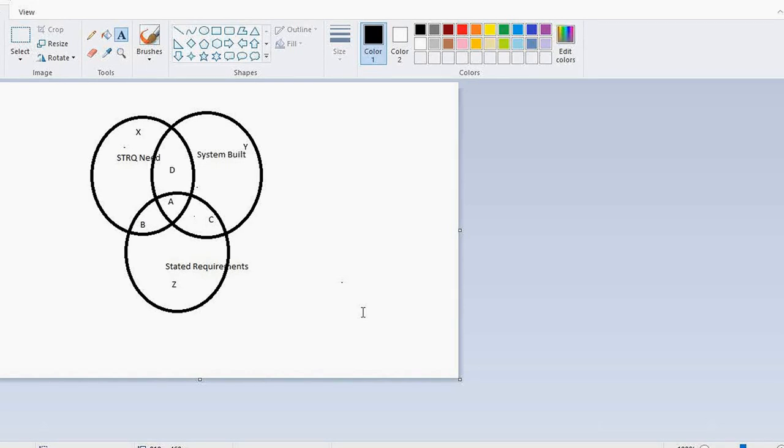So the key aspect is he may come back and say, your executive sponsor is not mine. I understand you want this requirement. Now you go talk to your executive sponsor, right? This happens a lot in the real world, guys. So that's when you would explain all of this and then add it to the next iteration, if everybody's on board. If not, you would negotiate the timeline and set a new timeline, set in stone.